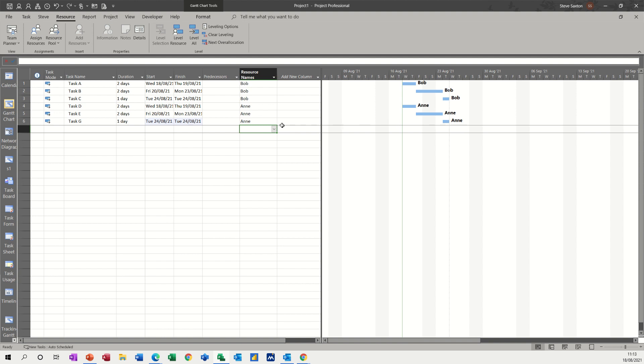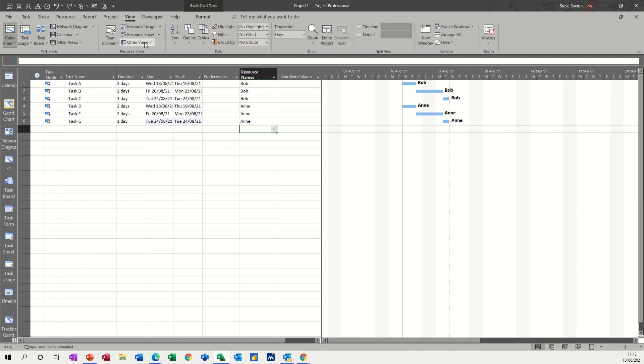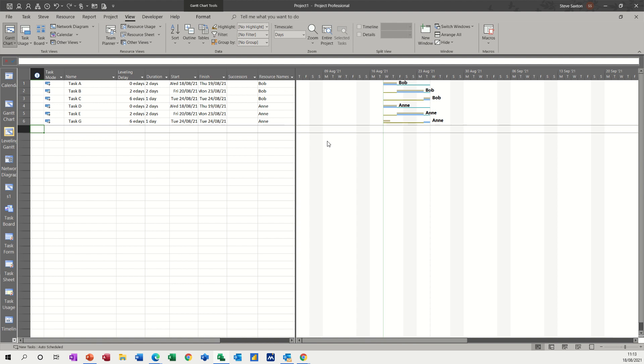Now if you've done leveling, I mean, we can still see these tasks quite clearly, but they may well move off the screen depending what this timescale is. So there is a view that you can select that will show you a leveling Gantt. So I want to go and have a look at that. So we've got view and then other views and then more views. In there, you have this option, a leveling Gantt, which I'll apply and it basically shows you the movement and the slack.